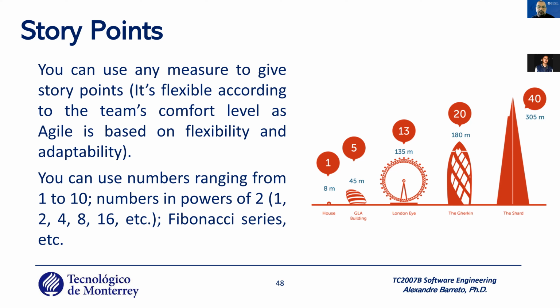Okay. The way to estimate the effort is comparative estimation. What does it mean? You select a task that you really know how much time is required to accomplish. You select one, and the others you compare. For example, you have a task that you know, oh, this task I know how much time I need, and you compare this other one.